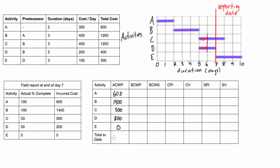Adding up these numbers, the total ACWP to date is $2,700. Next is the budgeted cost of work performed (BCWP) — this is how much money we were expecting to pay for the amount of work that was actually completed. We completed 100% of activity A and planned it to cost $600, so the BCWP for activity A is $600.